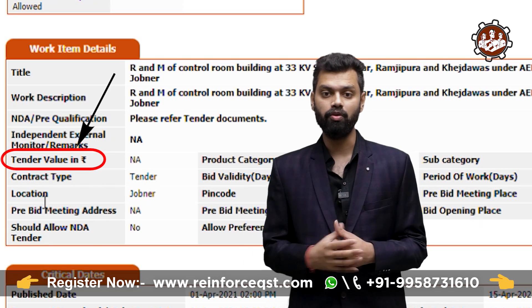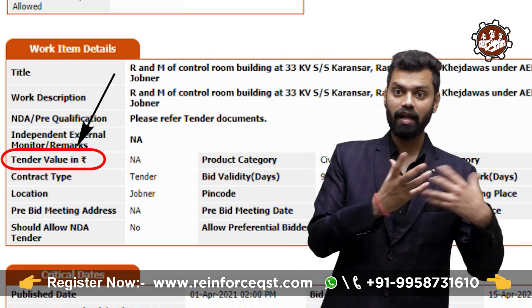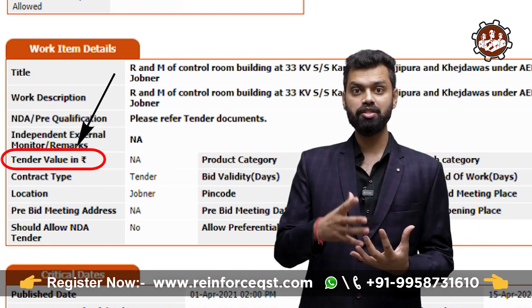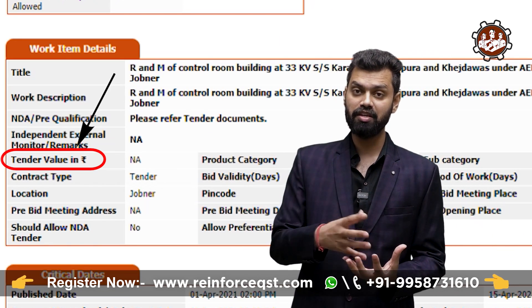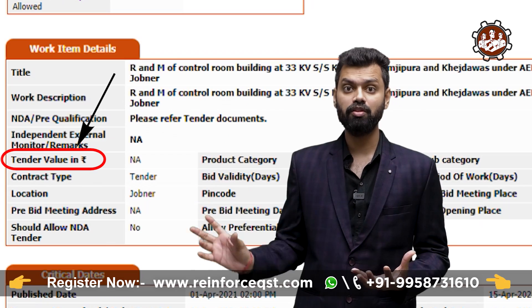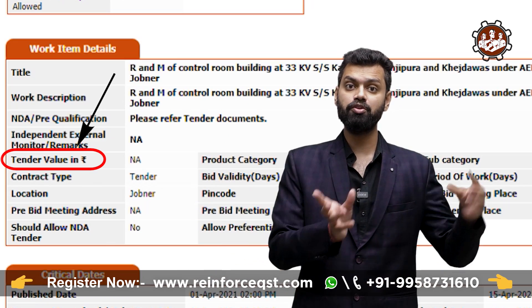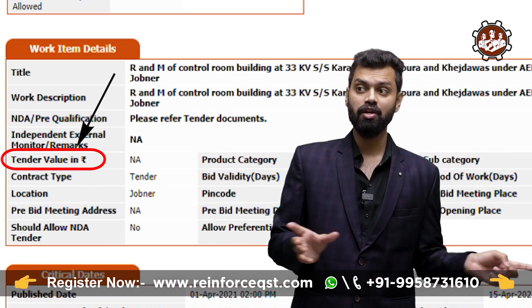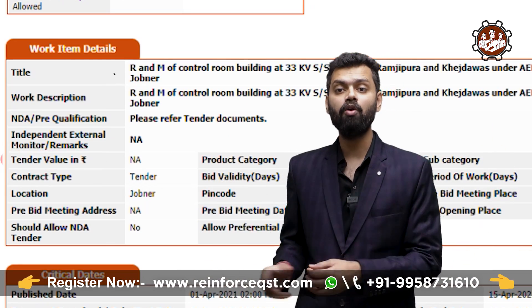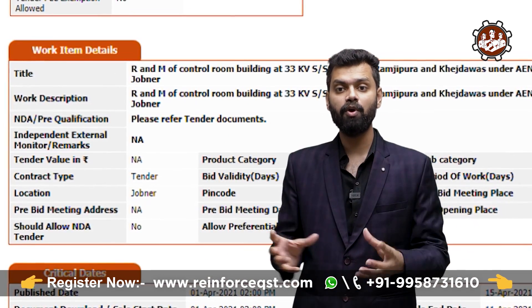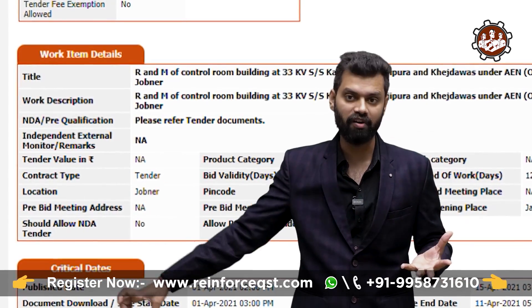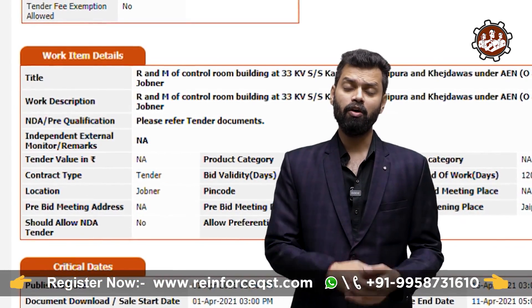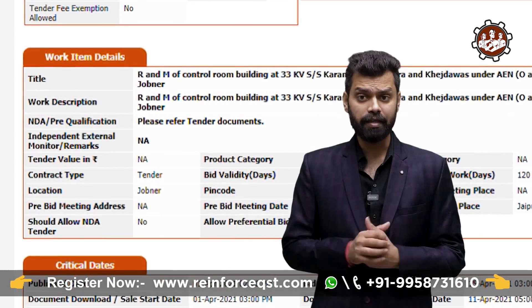Now, tender value means the project value — the BOQ amount. The client estimates and budgets an amount according to their rates, and the total BOQ amount is generally termed the tender value.